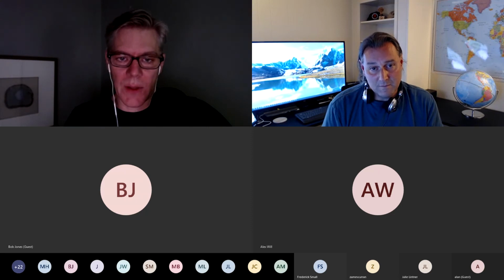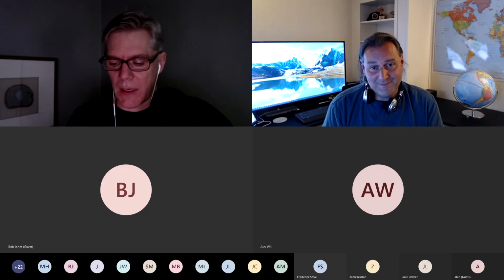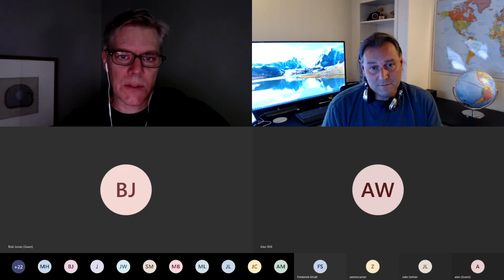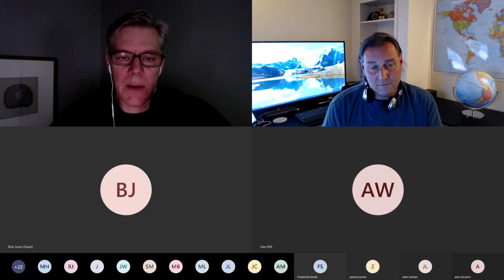Unless they're gargantuan and I was afraid to have all the money, all of my proposals would say, yeah, it's 100% upfront. Schedule this in my calendar. If you want to get started, here's how to make payment. And if it was $100,000, it'd be like, yeah, $100,000 upfront to block out the time in my calendar. And they'll probably negotiate with you on that, but that's fine. You can negotiate the payment plans. It's better than negotiating the price itself.